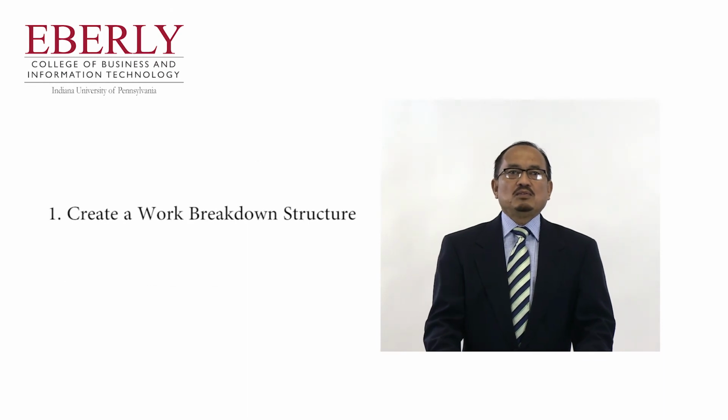1. Create a work breakdown structure. The key strategy for SDLC projects is to divide and conquer. Most such projects are too large, too complicated, and the duration too long to attempt to manage them as one piece. Successful project managers break the project into smaller and smaller tasks until each task is small enough to estimate and to manage.